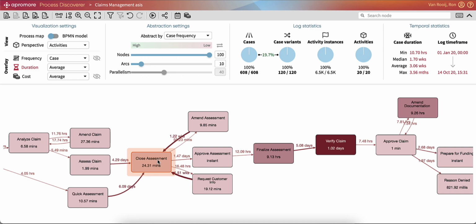Now this probably means that we found another bottleneck that's not based on cycle time, but that's purely based on resource and resource allocation. There's just simply not enough resources on the activity to perform the activity. And what's happening is that a lot of work is bubbling up in front of the activity. It's what we call dynamic wait time.